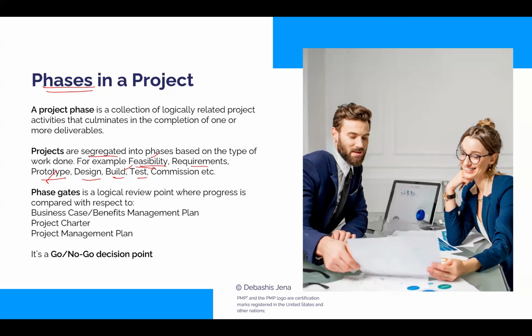And generally, a common practice is conducting a review at the end of every phase. Okay, so we would hold a review. Every phase, and we are going to hold a review here, here, here. This review can be given many names. I'll come to the names, but before names, the agenda of the review is pretty much the same. The agenda is, let's say we are doing the review at the end of phase 2 here. The focus would be to check, did we complete all the work in phase 2 as planned? Are the deliverables appropriate?